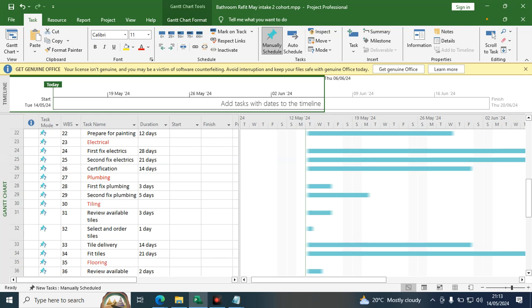In this particular project, we don't have work packages, as you can see, because if we had a work package, that means under each and every sub activity, you'd be able to see other work packages or subtasks. So you break them 3 times: from planning, then the activities under planning, then sub activities under the activities in the planning phase.